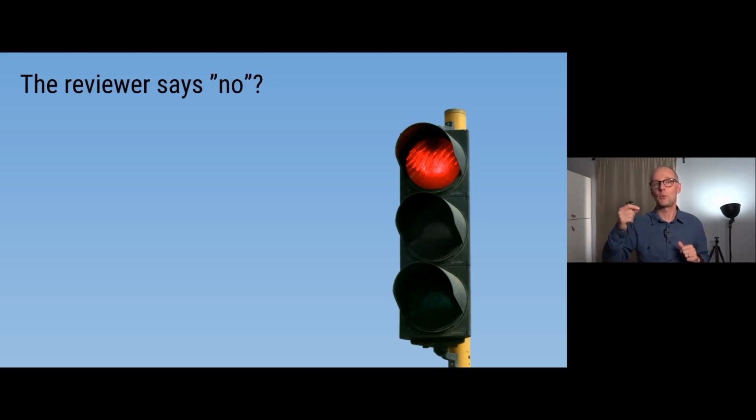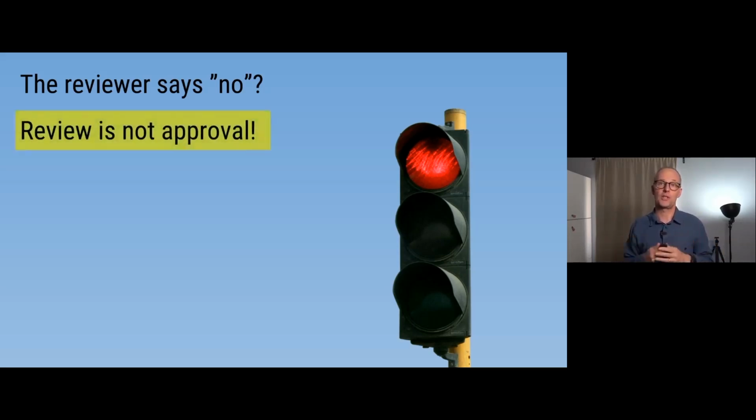And then sometimes the reviewer refuses to sign, which effectively puts a stop to the document, and you exert some kind of blackmailing here to say, well, if you don't change that, I won't sign, and you stop the whole project. So it's important to say review is not the same thing as approval. What I think you should be doing is to take those comments that have not been implemented, forward them to the approver and say, look, I as an issuer and the reviewer, we could not agree on these two things. We leave it to you to decide.